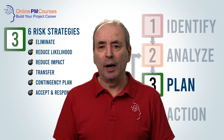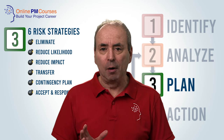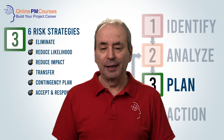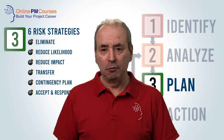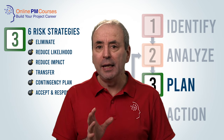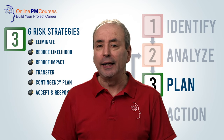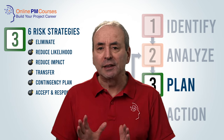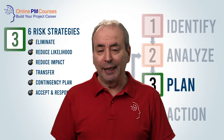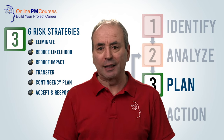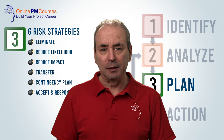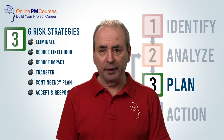I am aware that PMI introduced a seventh strategy — that of escalating the risk to a higher level of authority. But for me, all that is is offering the same six strategies to somebody else. It's not a new strategy; it's just an expedient based on management structures.